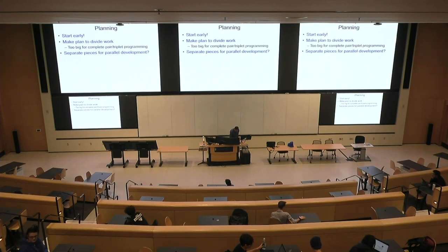Okay, so we got the idea of algorithm and UI separate. It's a good idea. How can I test essentially the UI when I don't have an algorithm yet? And this isn't a really complicated question. So if you're going, oh, okay, so C07, what do you think? Maybe create a fake set of data to put into your UI. Yeah, so you can essentially, it's like stubbing out.